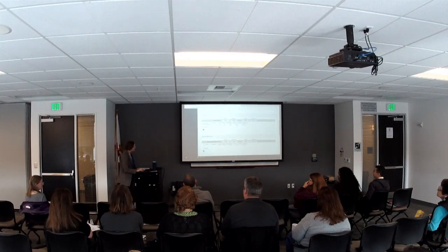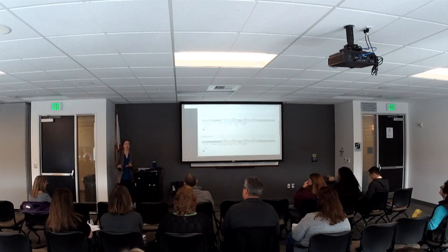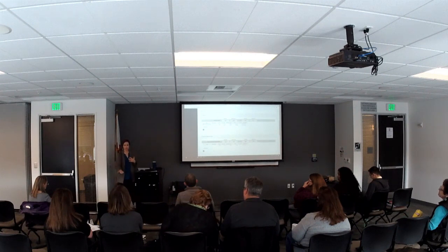How broken out do you want that activity table on, like, let's do a construction project? So this actually is a good opportunity to tie this all together with that task and milestones. If you wanted to say, okay, our construction project, we have architecture and engineering, we have our construction contract, we have our soft costs, if that's a level of detail you want to go to, great. If you want to be like architect line item, engineer line item, grading line item, flat work line item, the offsites line item, that's fine too. It's up to you how you want to structure that.